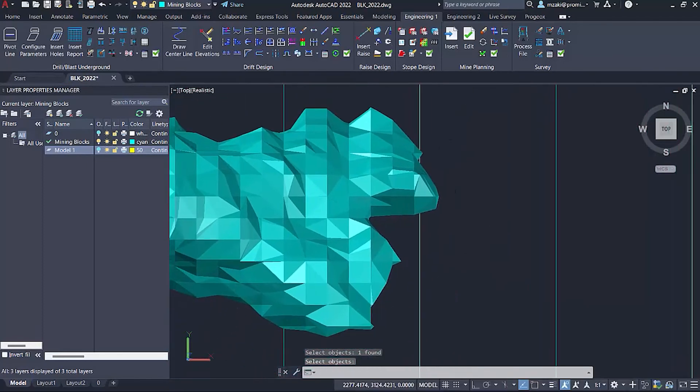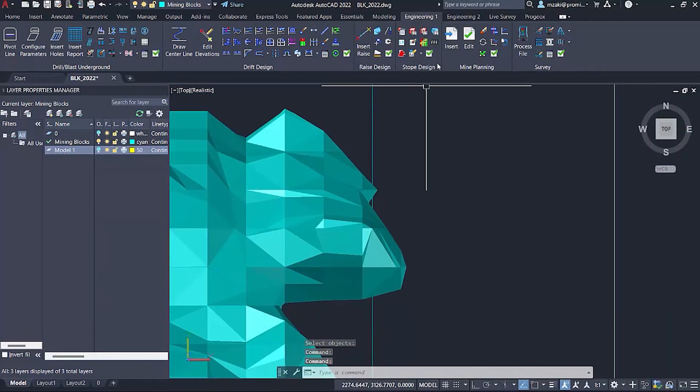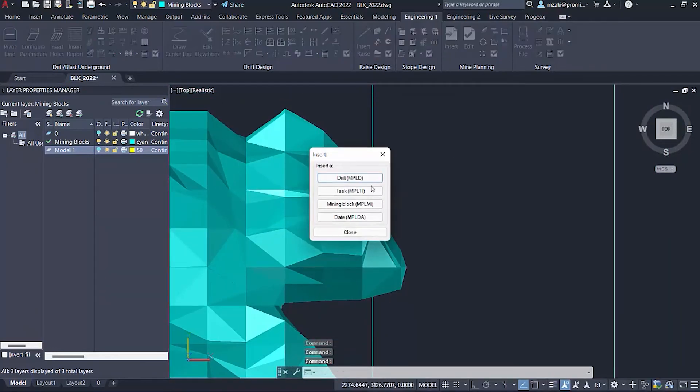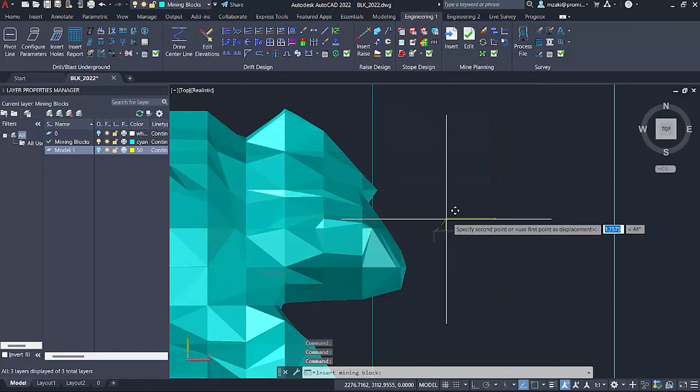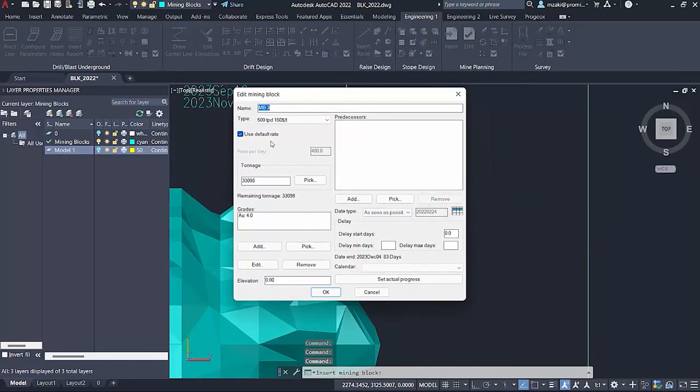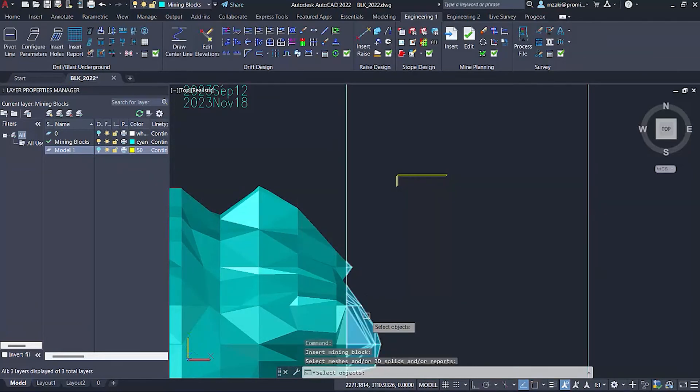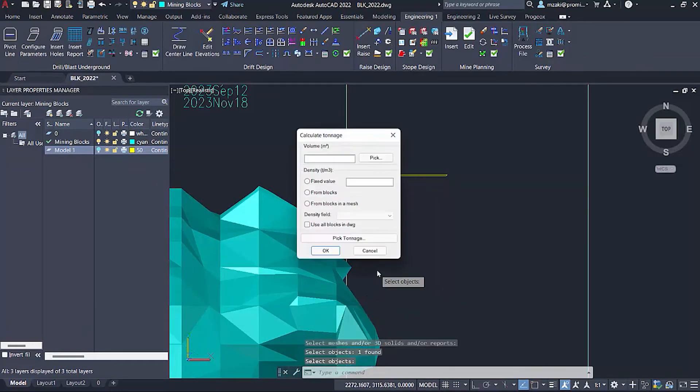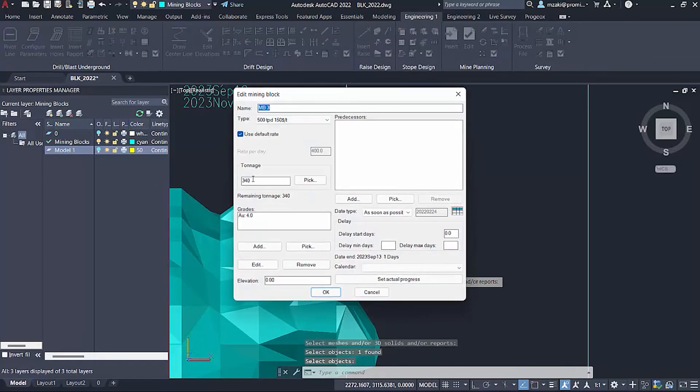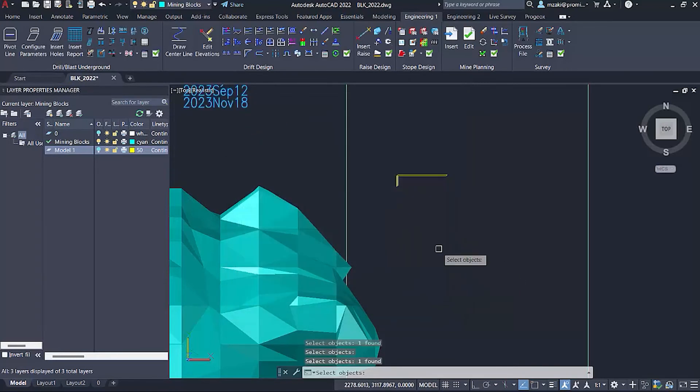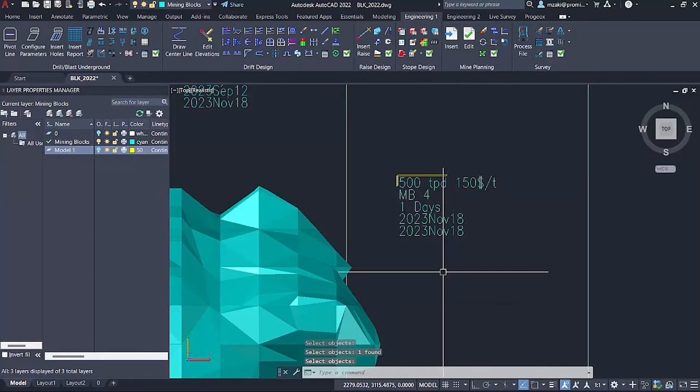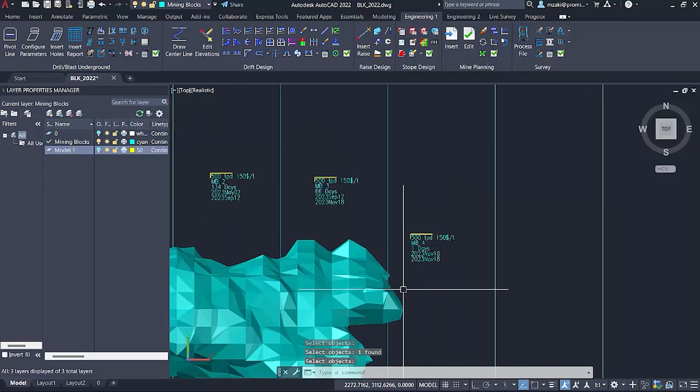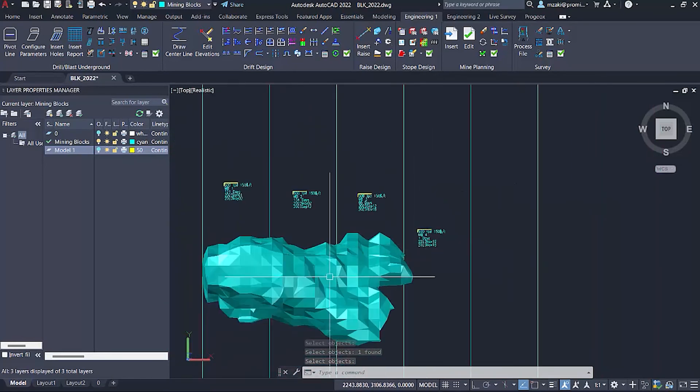Last but not least, we still have a little piece of tonnage that we can schedule a mining block for. This one will be very quick to mine. Select the tonnage. As you can see, it's 340 tons while we're mining 500 tons per day, so this should take one day to mine out. Predecessor will be mining block three. Don't forget to change the name. Calendar will be vacations. As you can see, this will take one day.